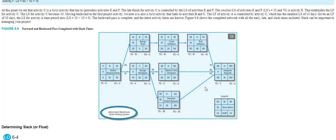So this means we have discovered the critical path of the project. All activities that have 0 slack is the critical path. They constitute the longest path in the project, and none of those activities can be delayed without delaying the overall project. And that concludes how we determine the overall project duration.